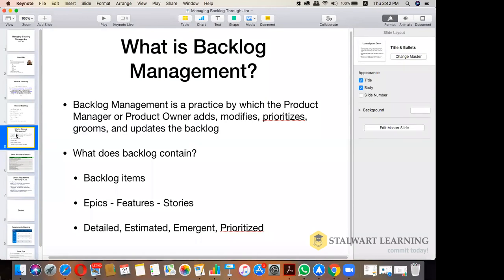to accomplish the stories. Now, different organizations use different models. They sometimes have epics, features, stories. Some of the models which are not Scrum based have a solution level in between: epic, feature, solution, or epic, solution, feature and story. So Jira offers only epics, stories and tasks. That is what Jira offers, and I'll show you that as well.